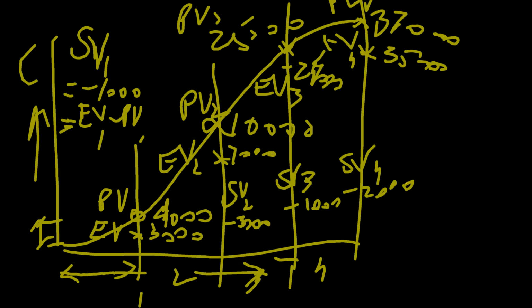It may, but basically it is not comparable because the values are cumulative. When I take out 3000 at 10,000, that is compared with 10,000. In the first month, out of 4,000, I have a variance of 1,000. Out of 10,000, I have a variance of 3,000.